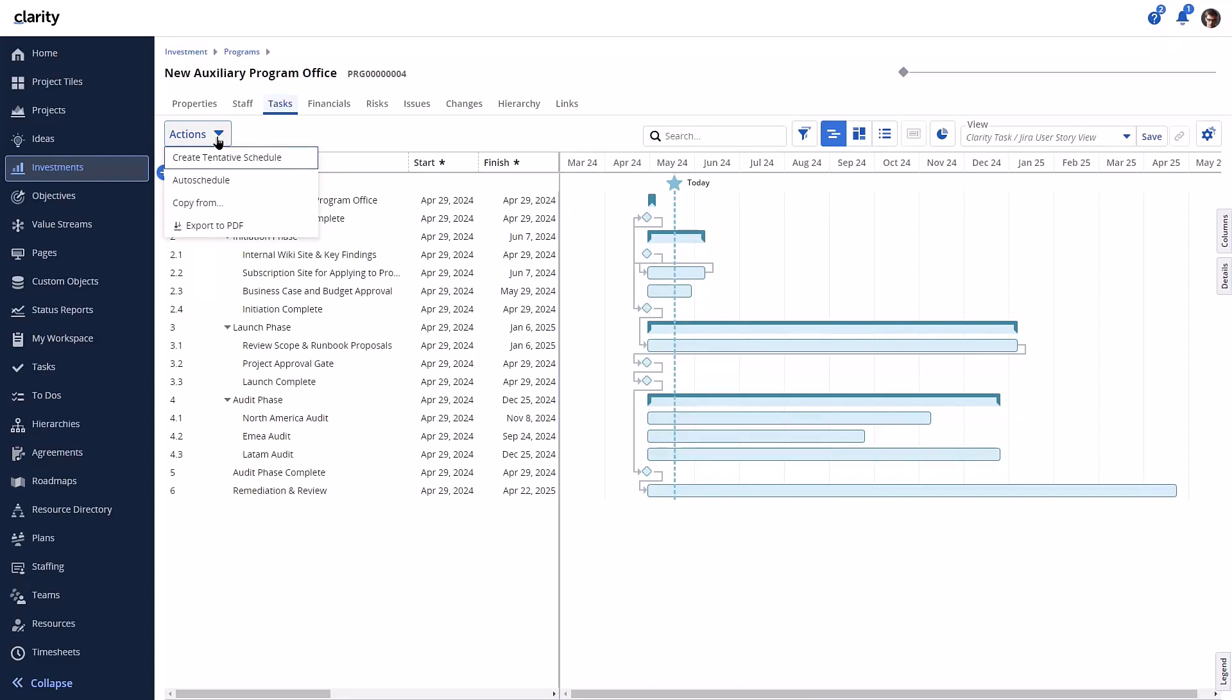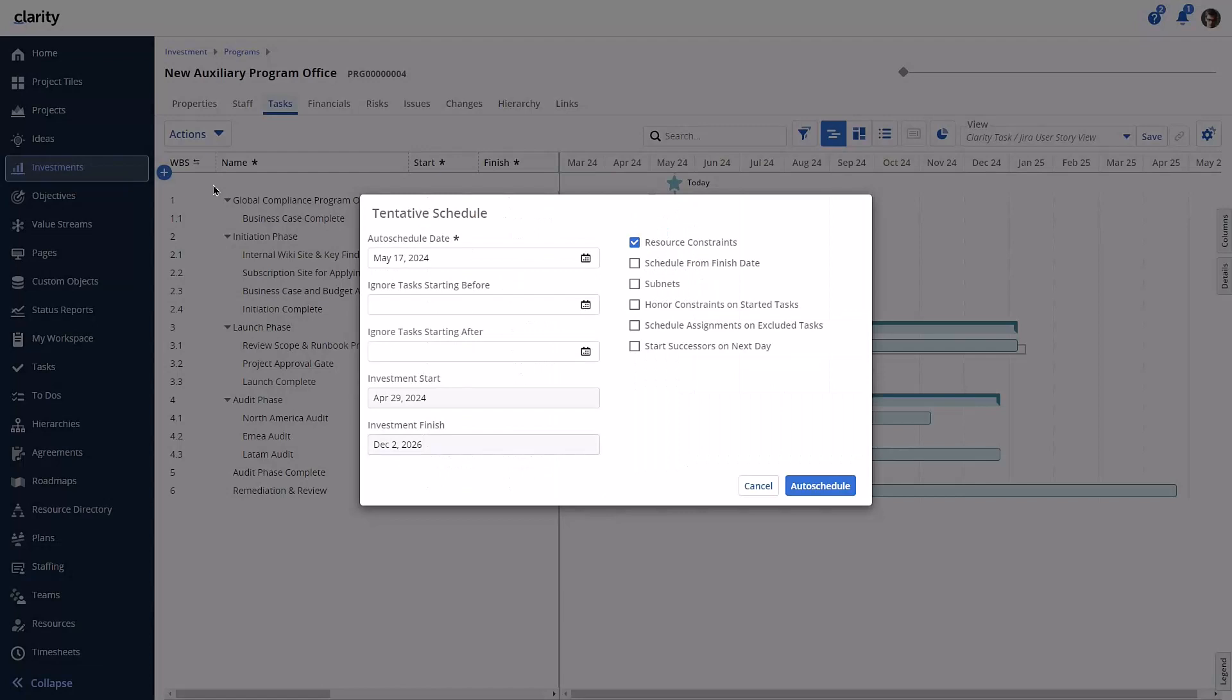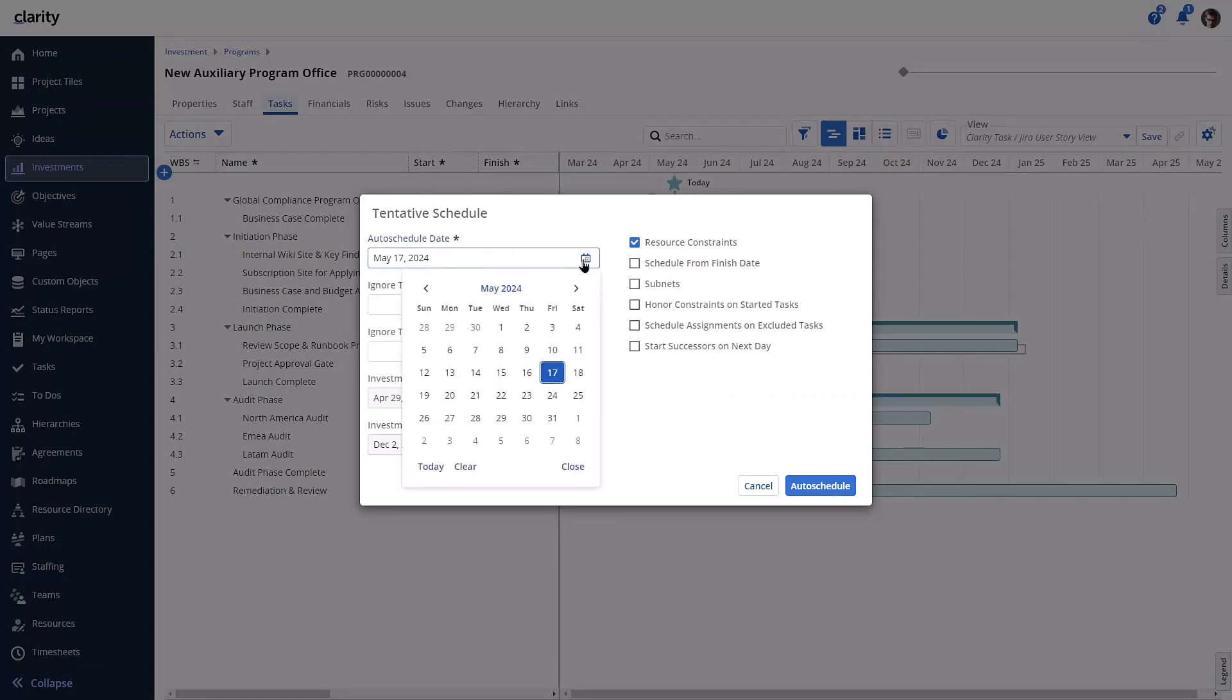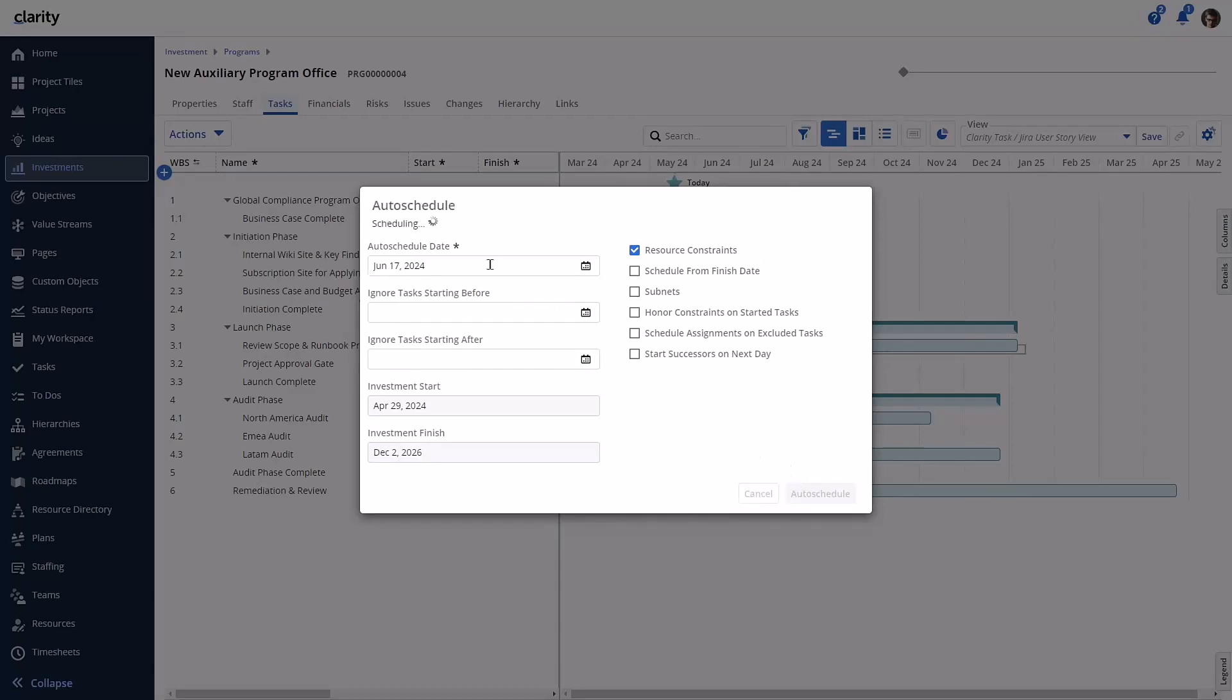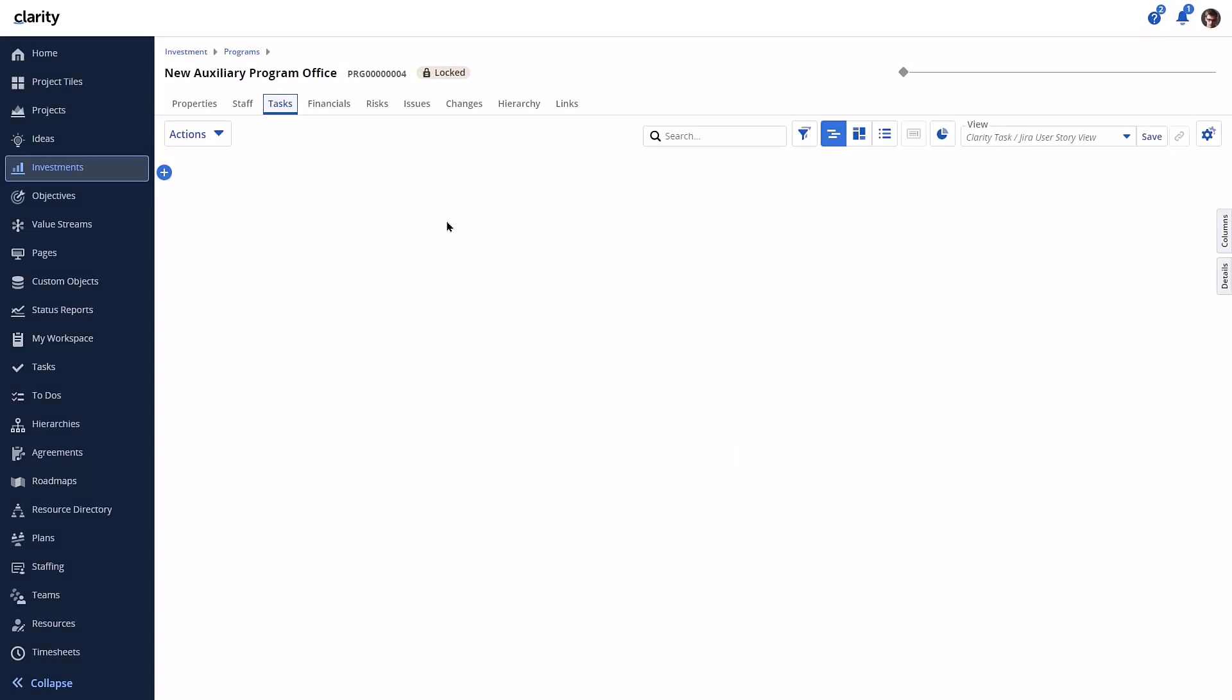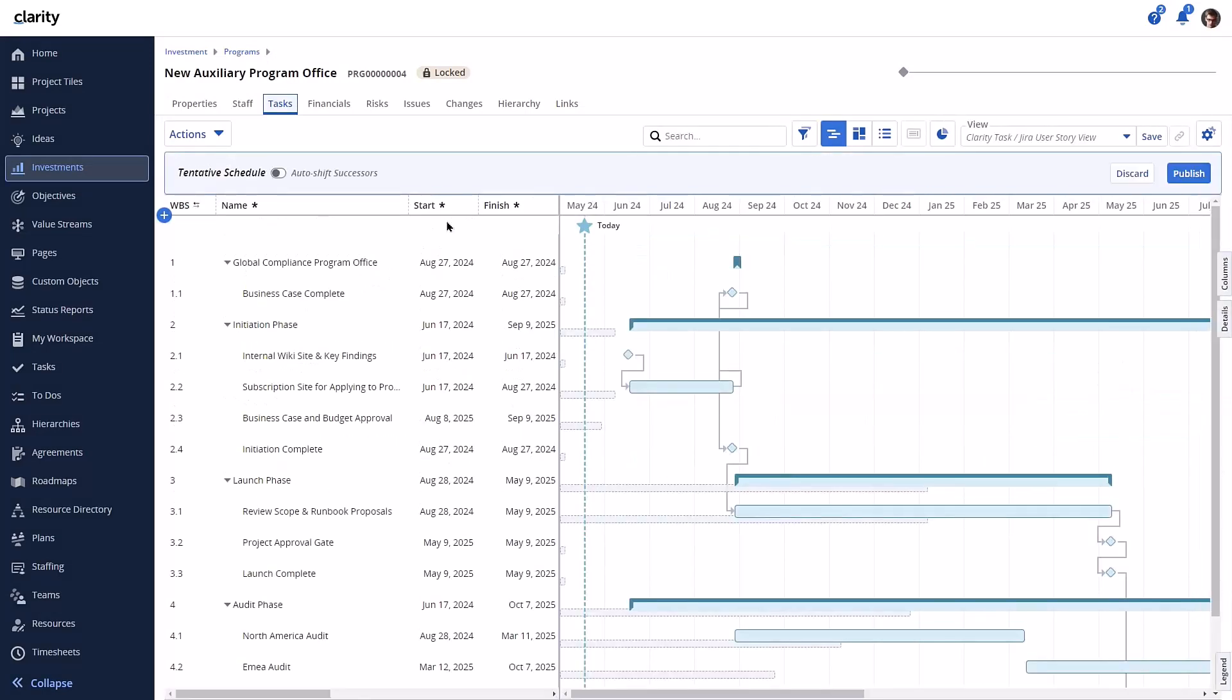There are two new actions on the timeline layout, the Create Tentative Schedule and Auto-Schedule. Creating a tentative schedule simply puts the plan into a tentative mode for changing task dates without using scheduling. Let's use Auto-Schedule. We'll push the start date out and include resource constraints. Once the schedule is created, it is now a tentative schedule for which the manager can make further manual adjustments.